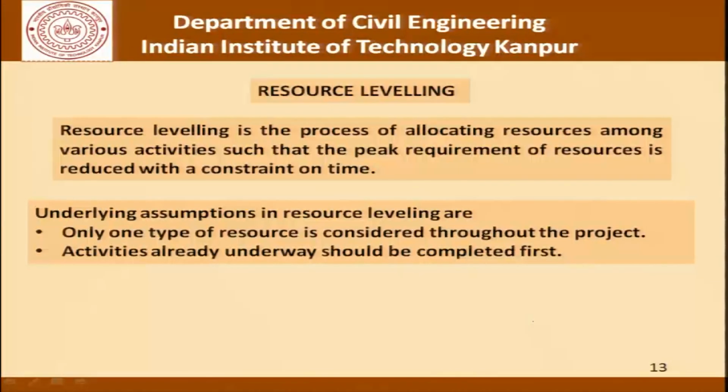What I would like you to recall is that activities are of two types, let us say critical activities and non-critical activities. Critical activities are those which must follow one after another without any gap. Without any gap means there is no float, and at the completion of these critical activities the project is completed. So, basically the last activity to be completed has to be a critical activity, that is by definition.